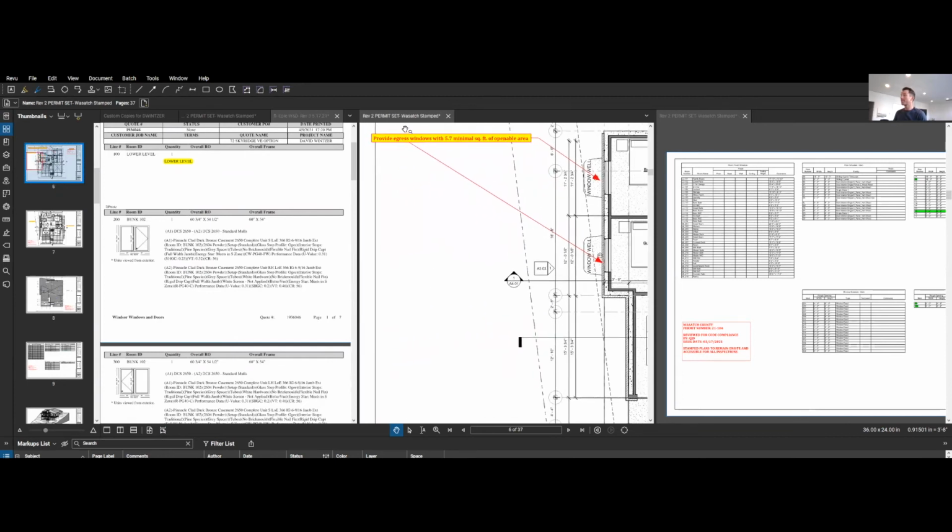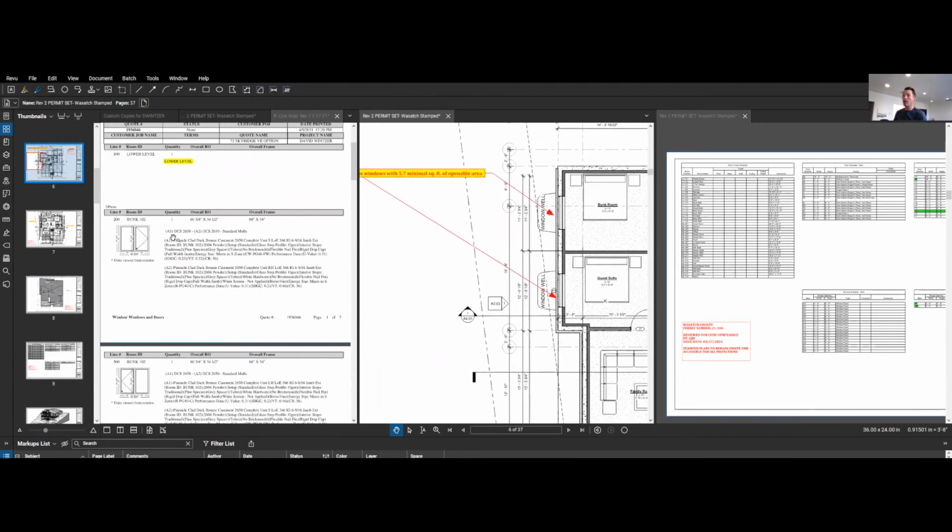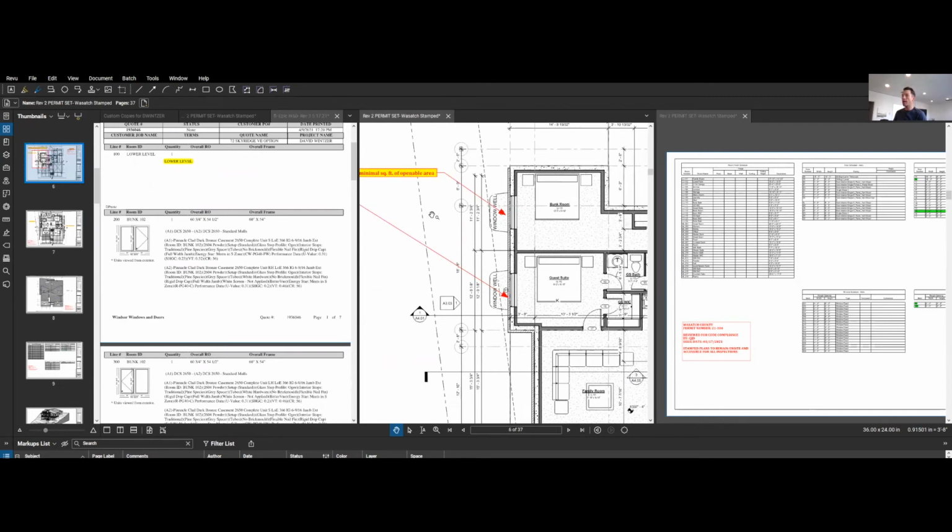This is from the county, make sure you provide these with egress. So what we obviously did, and we checked out the rough openings. This was a bigger issue because these are embedded in, these are in concrete. So these rough openings had to be blocked out when we formed the walls. That's a number you definitely got to get.